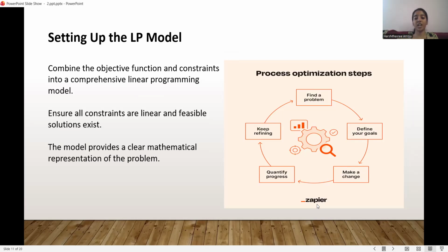among competing construction activities. For instance, in a sample problem, a company may find that assigning 32 labor units to residential work and 12 to commercial work yields the maximum profit while using all available labor and material budgets efficiently. The simplex method also provides shadow prices, which indicate how much additional profit can be gained if more resources like labor or budget become available. This analysis helps managers identify bottleneck resources and plan better for future expansions.